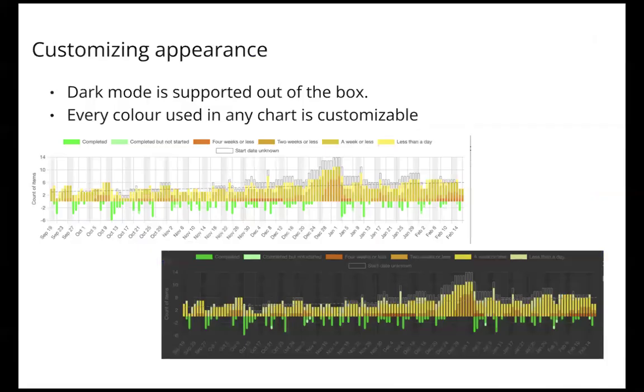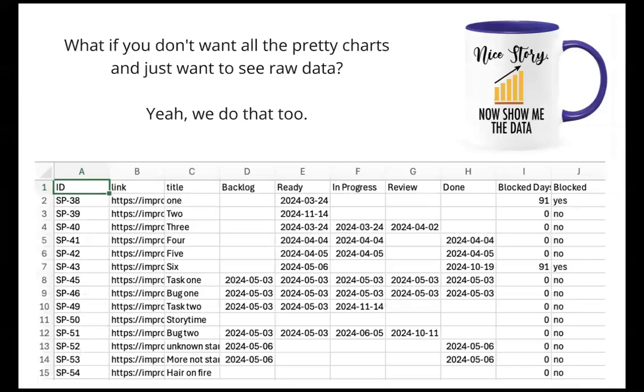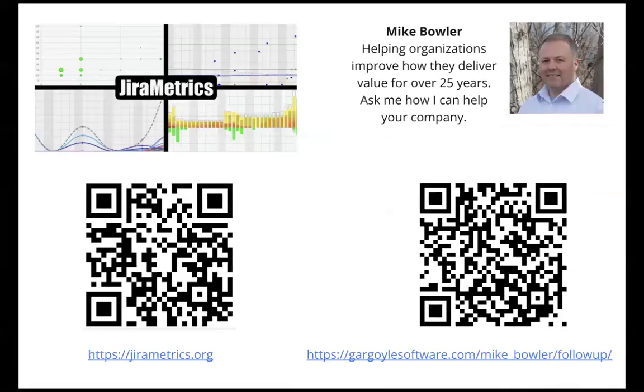Yeah, in a certain sense, it doesn't matter, like some of the micro statuses. It's either to do, in progress, or done. And if it's blocked, it's still in progress, right? Mm-hmm. So what I like to do is think about, can we run a Kaizen or something on that, map out what the process is, figure out where the waste of the waiting time is, et cetera, and then we can try to relieve that. And what we'll see is our in progress will go down over time. I mean, our cycle time for in progress.